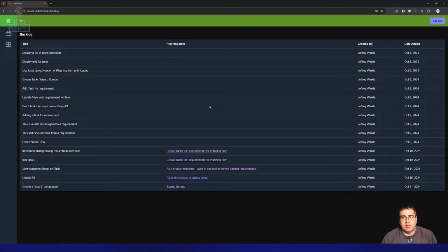Here's a simple example of opinion. Not saying this is valid, but instead of simply devs scoring stories, have management score a value point in a story. Then management can see value created per sprint, not just features completed, which is amorphous.